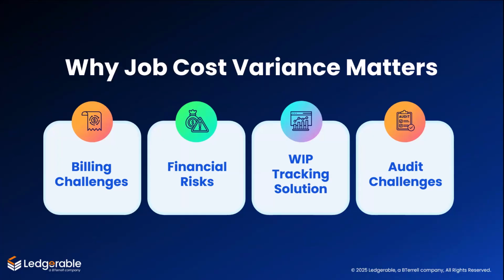And once they implemented the automated WIP reporting that tied to actual job cost, the story completely changed. Their schedule started to reflect true percentage completion, revenue recognition became consistent, and the next time the bonding company looked at their books, the response was that this was one of the cleanest WIP reports they had seen. And that single change didn't just improve reporting, it gave the company confidence to pursue larger projects, knowing their numbers would stand up to outside scrutiny.